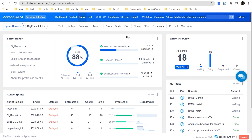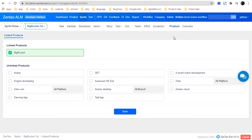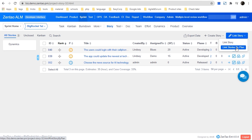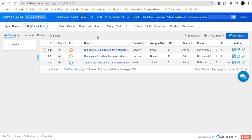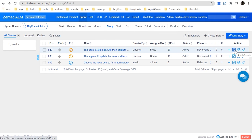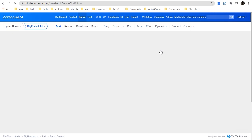After you have created the sprint, you should go to Sprint Product to link the product, so you can get all the stories from it. Then go to Sprint Story to link all the stories you want to complete in this sprint, or you can link stories by plan, which was created in that product. After linking all the stories, you can click 'Batch Create Tasks' to break down all the stories into tasks and assign them to users.